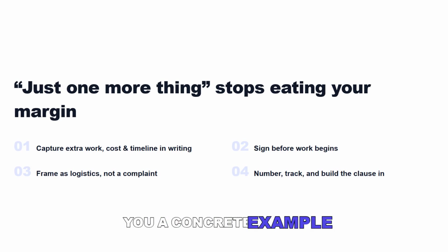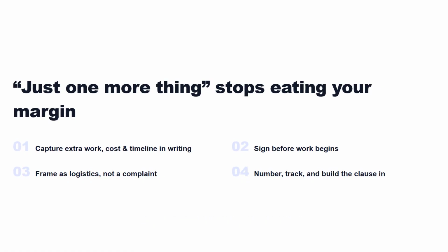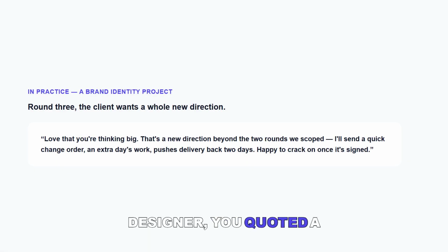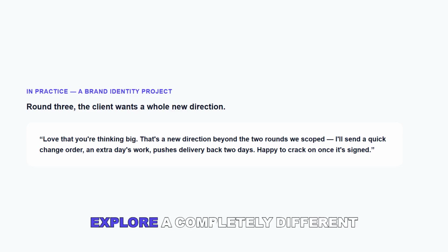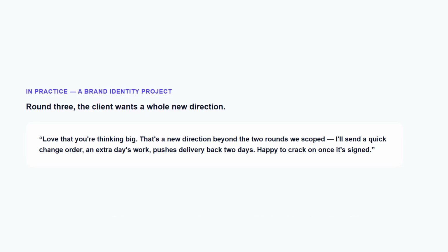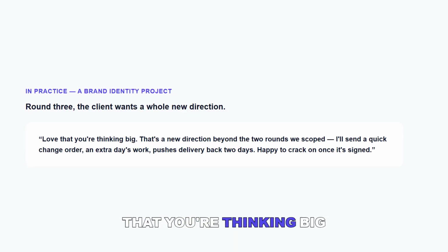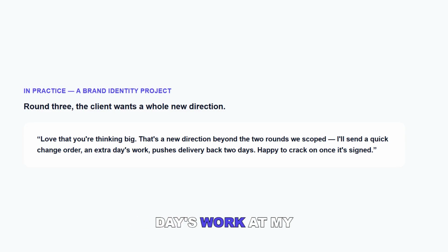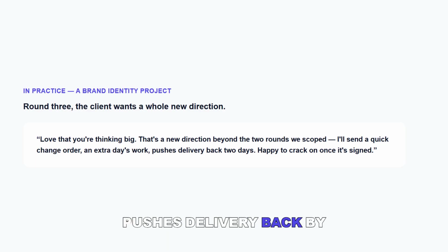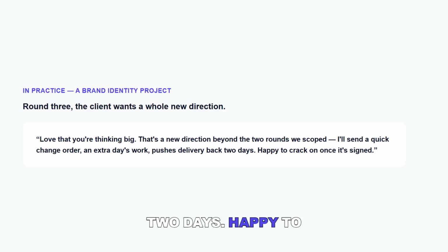Let me give you a concrete example of the wording in action. Say you're a designer, you quoted a brand identity with a logo and 2 rounds of revisions, and the client comes back on round 3 wanting to explore a completely different direction. You reply, "Love that you're thinking big about this. That's a new direction beyond the 2 rounds we scoped, so I'll send over a quick change order. It'll be an extra day's work at my day rate, and it pushes delivery back by 2 days. Happy to crack on the moment it's signed."